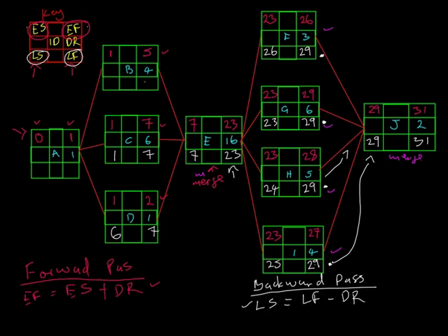What is the successor of activity B? It's E. What is the late start of E? It's 7. So our late finish of activity B is 7. What is 7 minus 4? To get the late start of activity B, 7 minus 4, the last time I checked was how much? Oh, I can't believe I'm counting 7 minus 4, like seriously. Oh, 7 minus 4 is 3, everybody. Yeah. Okay. Now, we go to activity A.